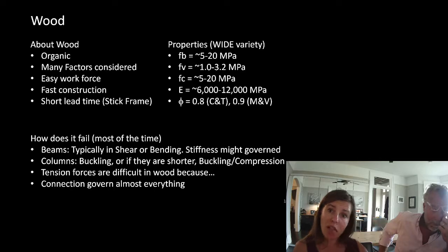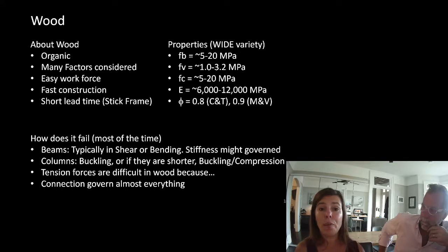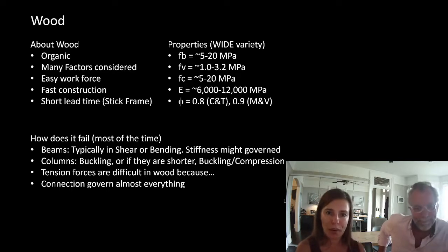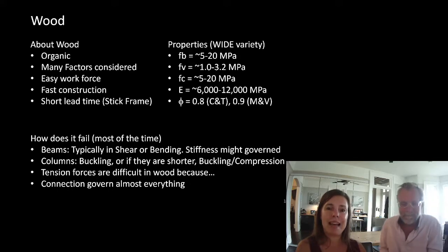If you guys are all coming over on the weekend to build a deck with me, I could go buy all the material this afternoon. And it would be done on Monday. We'd have it built very fast. There's a short lead time for stick frame construction because I can go buy all the materials. Obviously, that wasn't true during COVID. There was a real wood shortage, which meant that costs tripled for most instances of wood, but that seems to be settling out now.